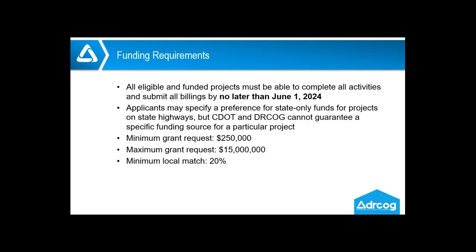Eileen also had an additional question: if a candidate project already has federal or TIP funding associated with it, are those funds counted as local match? No, they are not. Federal funds obviously can't match other federal funds, so that would not count. We are looking for a 20% minimum local match, non-federal, non-state, to leverage these funds.